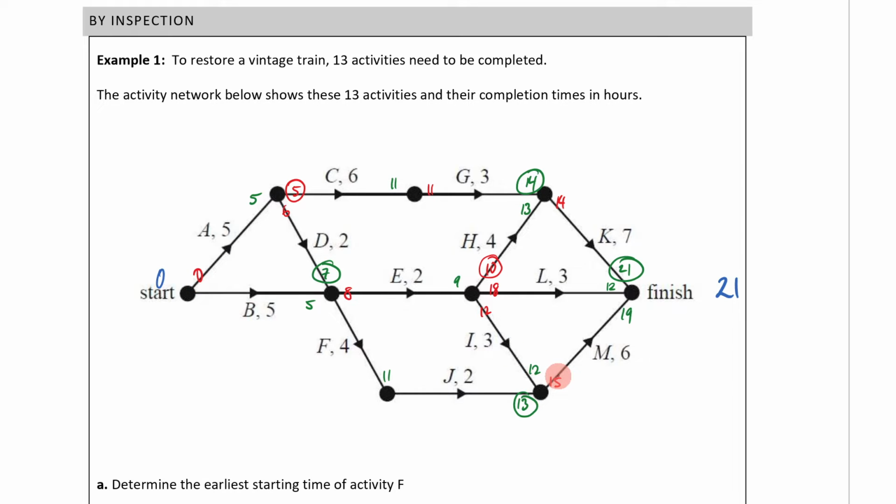Over here, we jumped the gun there. We should have waited until we got this one first. So let's just pray to the mathematical gods that we don't mess this up. 15 minus 2 will be 13. 13 minus 4 will be 9. Phew. 8 is the smaller number there, so we are safe because that's going to be 9 there. 13 minus 4 will be 9. That means 8 minus 5 will be 3 here.